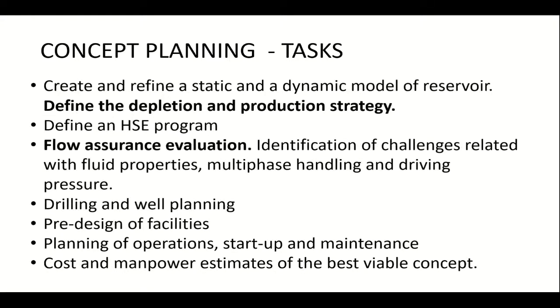Some engineering tasks that are made are, in this case, I try to come up with a static and a dynamic model of the reservoir. The volumes, the geometry, but also dynamic in terms of how this rock is going, how this fluid is going to flow. Okay, how is the fluid going to flow in the reservoir? Then define the depletion and production strategy that typically I try to come up with during this phase, during concept planning: how I'm going to produce the field, how many wells I'm going to need, what rates I'm going to produce in which year.